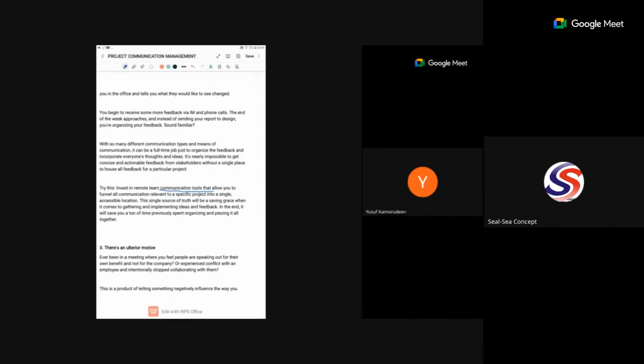If there's a particular unit, maybe your project team members' reports, you can give them a channel. Are they using the WhatsApp platform? Is that what they are using to give reports? Let them stick to it, so that you are not expecting reports that did not drop on WhatsApp, but you don't know whether they have sent it to mail. I don't know whether they have inboxed it. Because you have various channels, you become disturbed checking all these channels to be sure whether they have sent it or not.